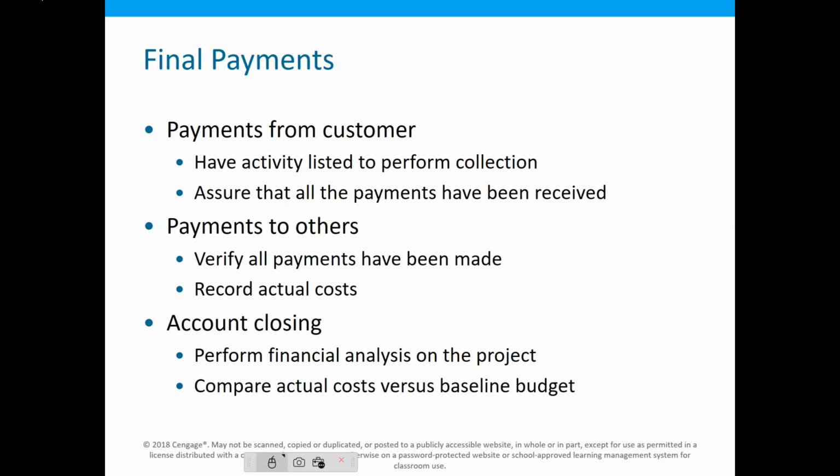Or if I'm financing, the bank typically will hold that 10%. That way, if the foundation cracks, hopefully there's enough money in that to pay for it and we don't have to sue the builder. We just take it out and say, well, we fixed this problem you did, so now you don't get the full 10%. There's only 2% of that money left.